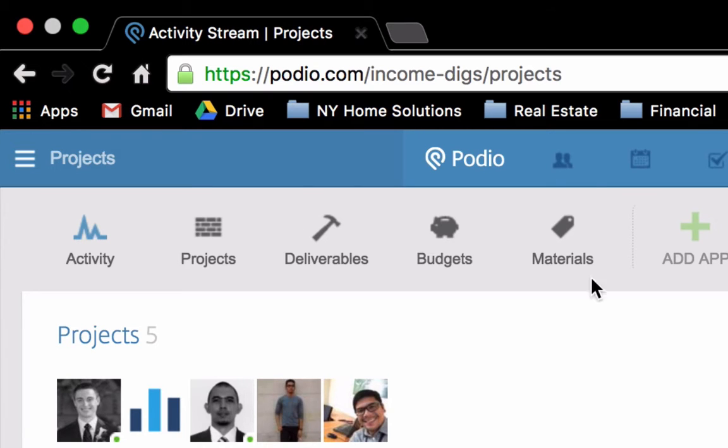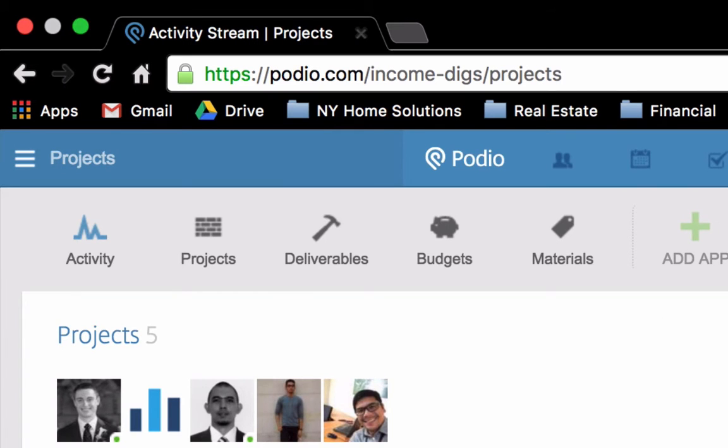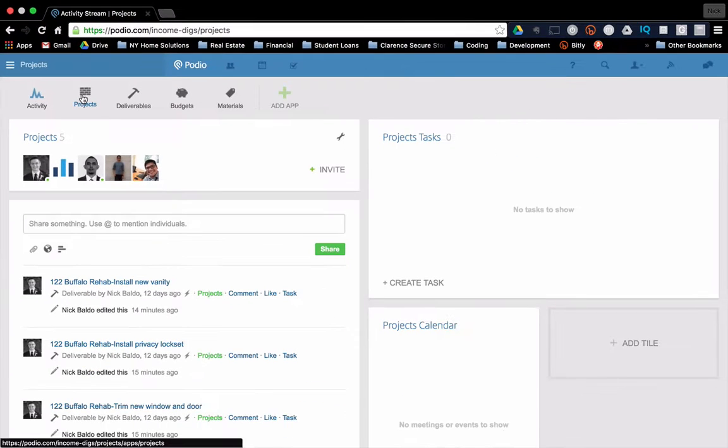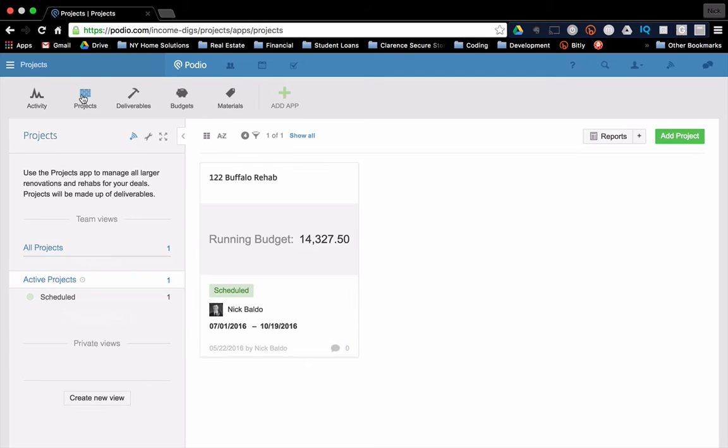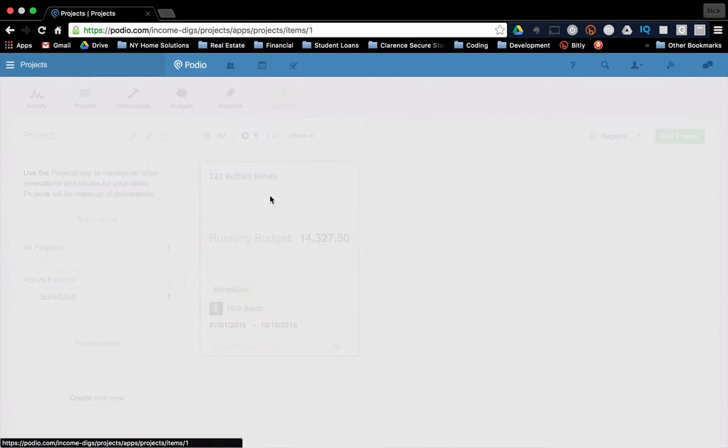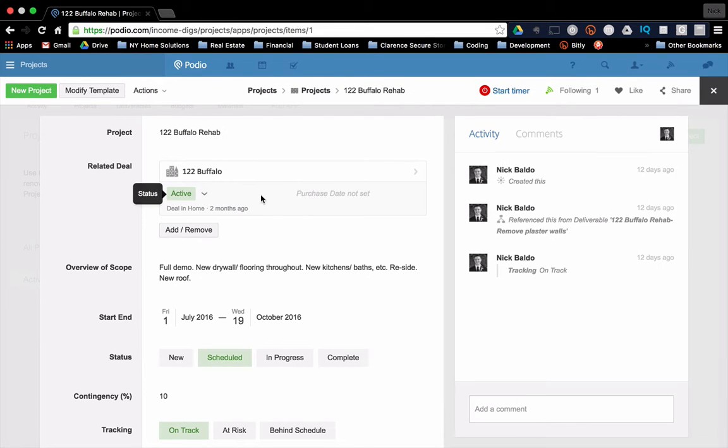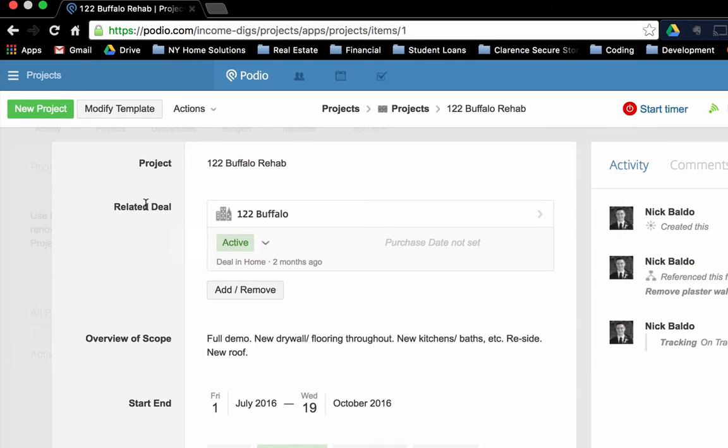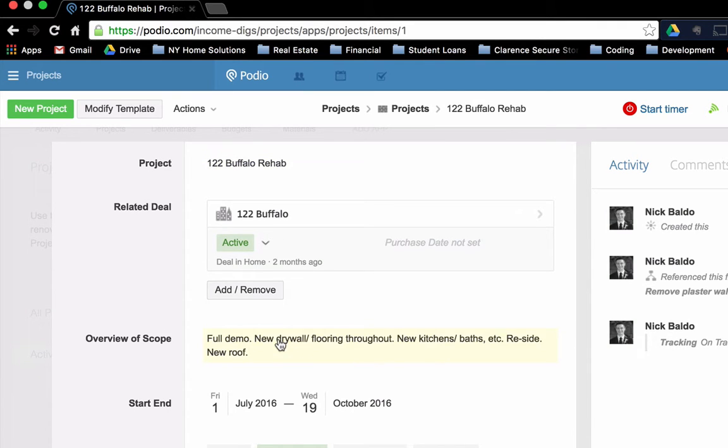Okay, so let's get started. So I'm in the projects workspace here, and I'm going to go to projects. Projects is very simple data goes in here. So we're looking at anything, any major rehab, any major renovation would go in here. So if we take a look at a sample project that I have here, it's going to be related to the deal. So you'll recall that we have a deals app, and those are all the properties that we purchase. Okay, so you have the opportunity to relate it to a deal. Okay. A brief overview of the scope, potentially a start and finish of the project, the status.